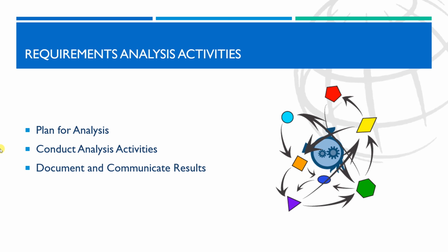For example, projects using adaptive, agile, or lean methodologies favor less extensive requirements specification because the development environment is more collaborative and can use conversations over documentation.